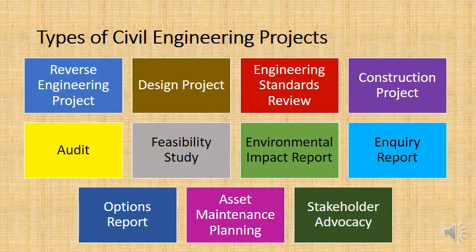When they built that dam, they did not consider the land that would be flooded behind it, and it actually flooded the road. So stakeholder advocacy gives stakeholders an opportunity to make sure that their view is heard, and they will often hire civil engineers for doing that.